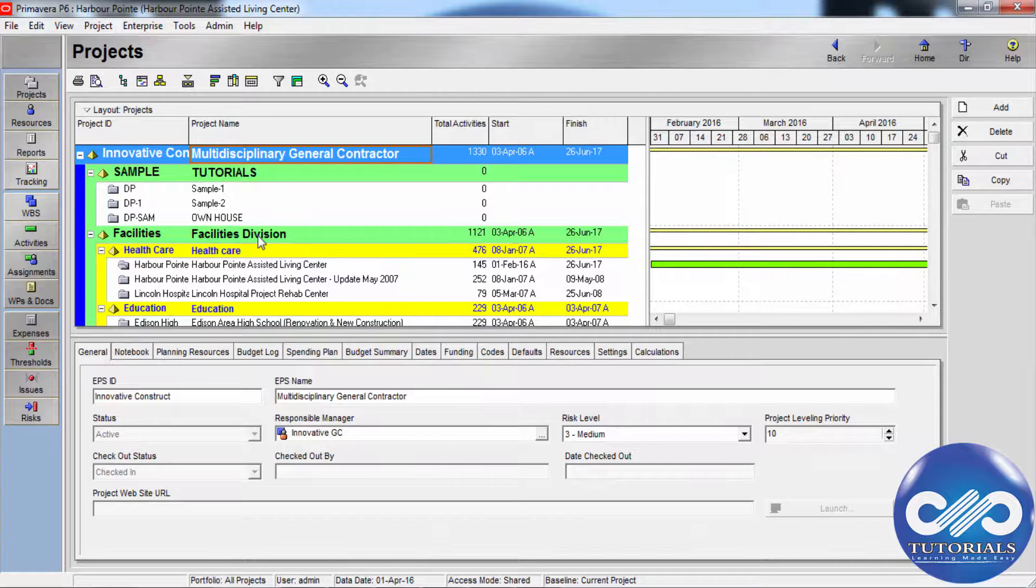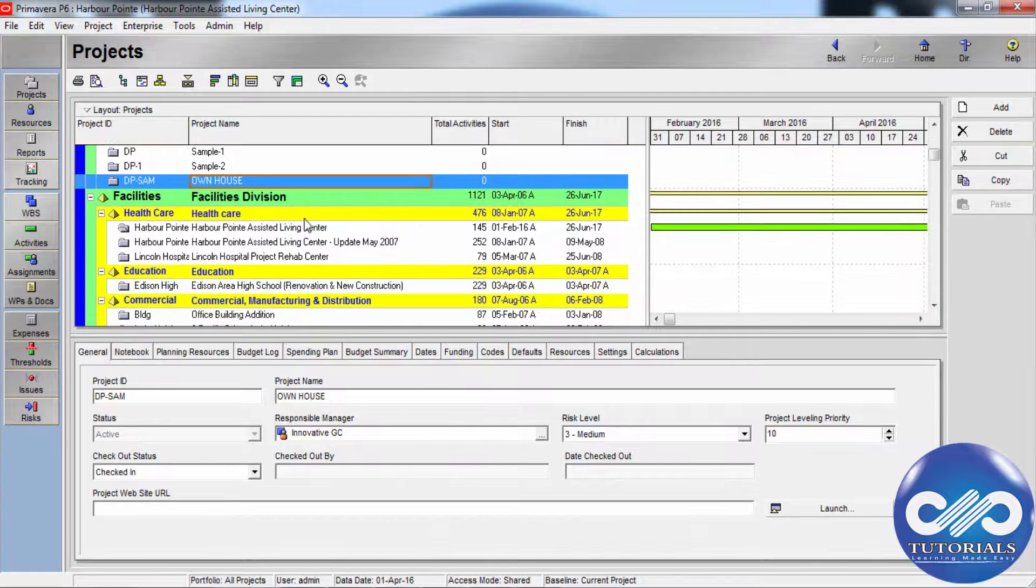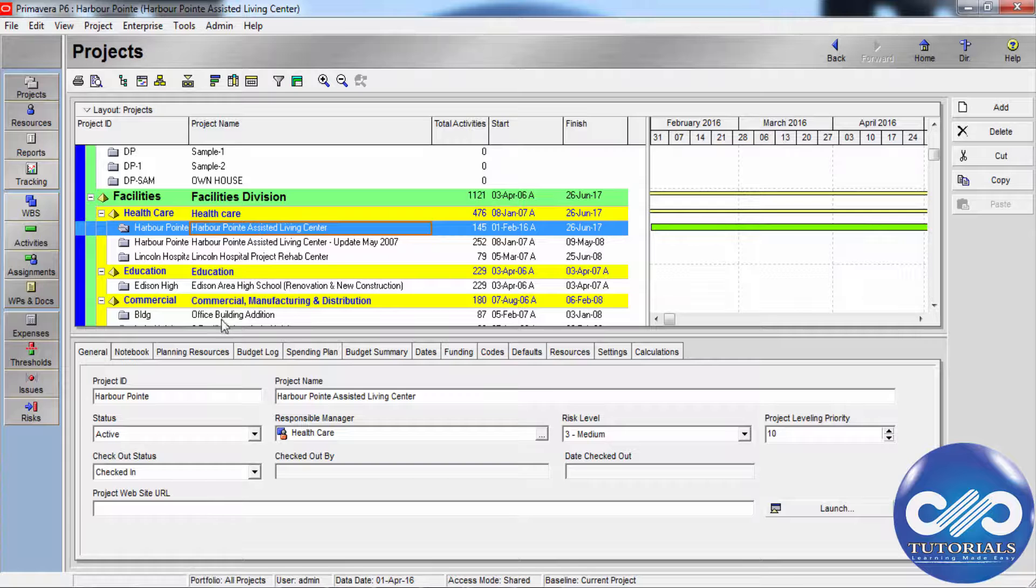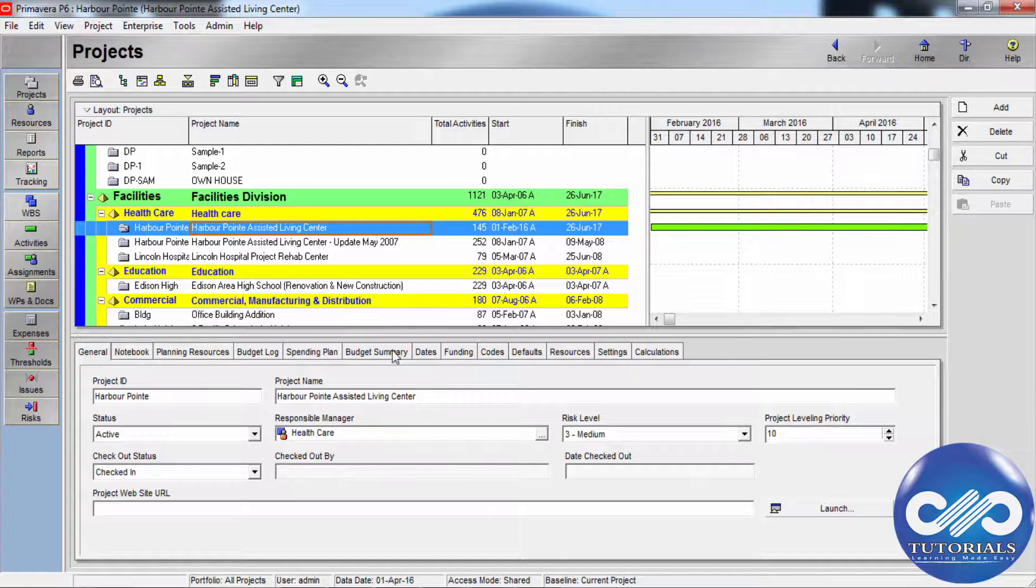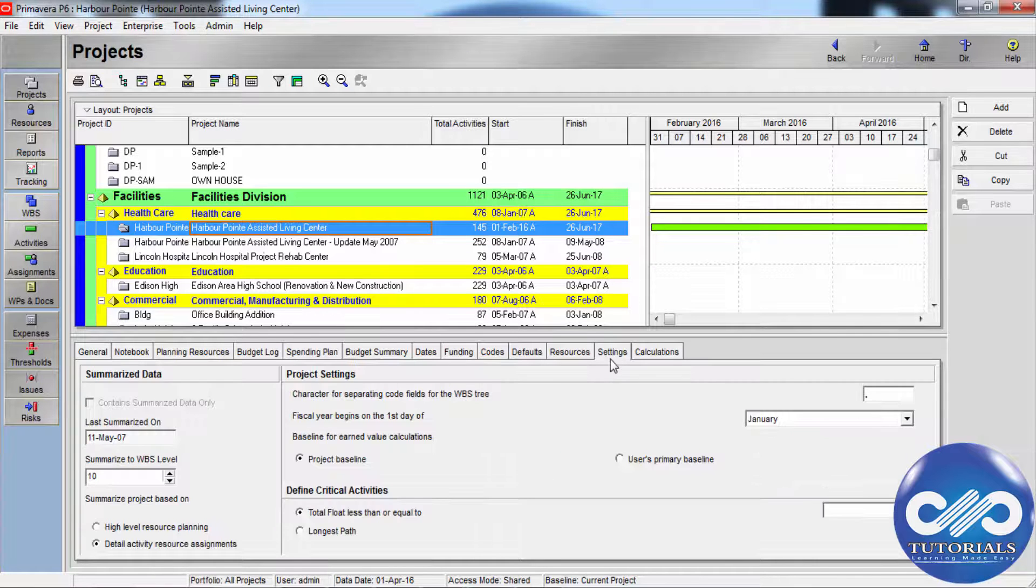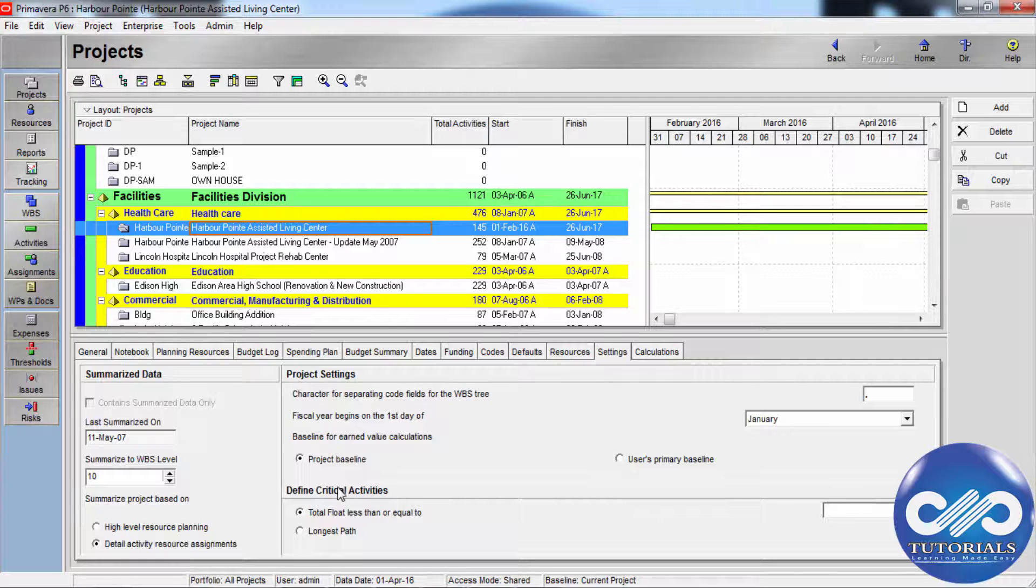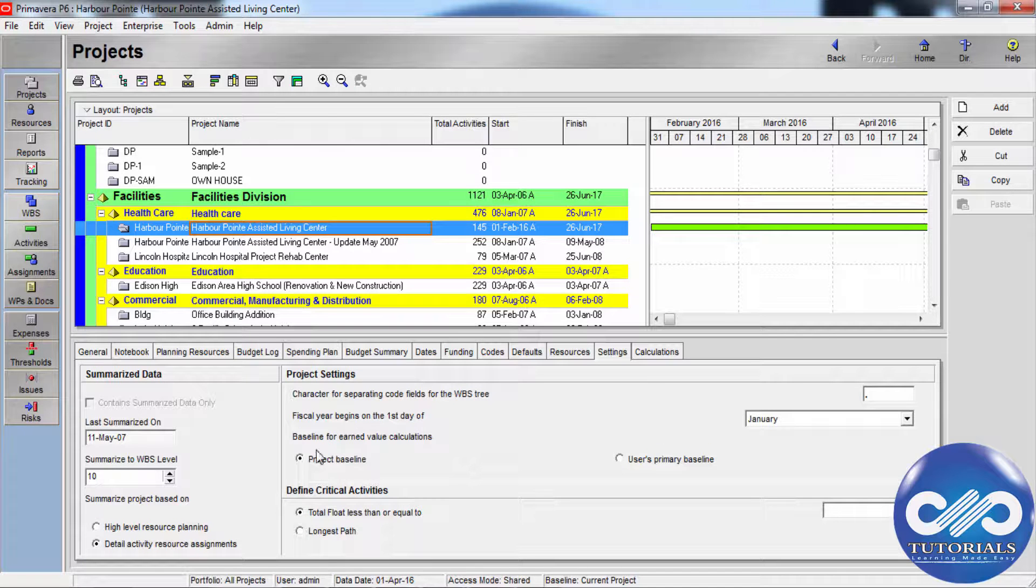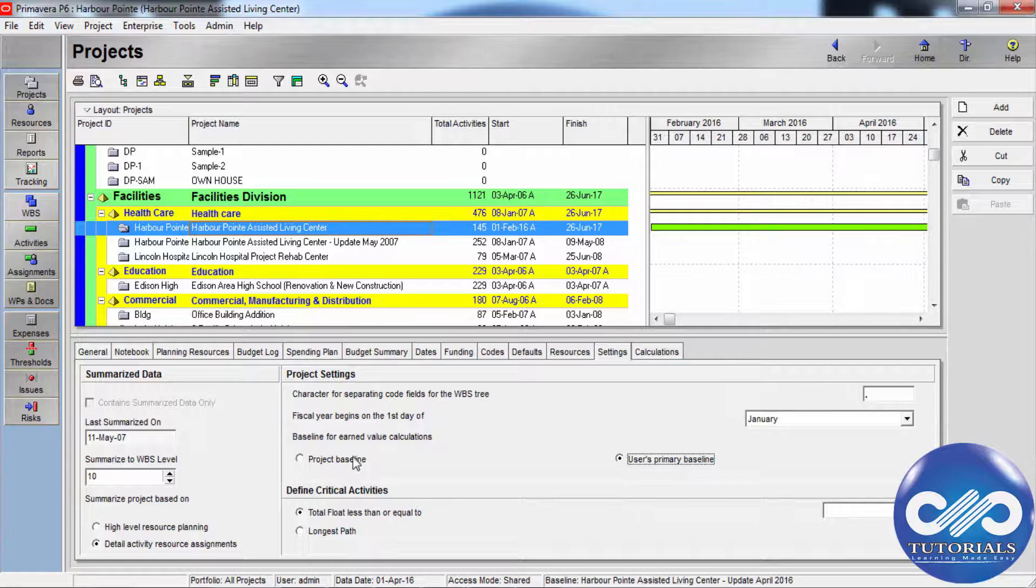first go to the projects window, select a project here and go to project details and click on the settings tab. Choose to calculate earned values using the project baseline or the baseline you have defined as your primary baseline.